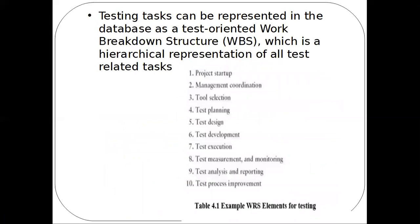The next topic is testing tasks represented using WBS. An example of WBS for testing-related tasks: we can have 10 high-level tasks, each divided into low-level tasks. For example, taking a tool selection high-level task, the low-level tasks are: what tools are there, how to select the tool based on reliability, how to provide it, and how to execute it. These are the steps followed in the low-level tasks, which is the WBS for testing.